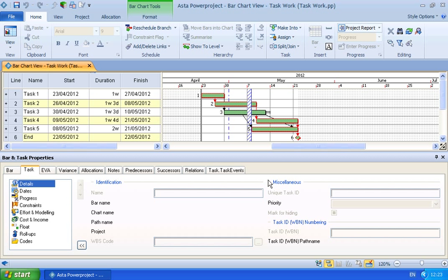However, we are looking to be able to track quantities of work required and maybe even model our tasks based on that. So what we're saying is, given a certain amount of work, a work rate, how long will the task take? Now, previously, that type of information hasn't been possible to get out of the software without allocating resources to the plan, and that's a process that many users find complex and time consuming. So introduce task work, which allows you to put an amount of work and a work rate directly onto the tasks in your project and to model tasks based on that information without the need for resources.